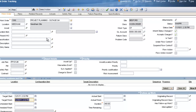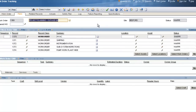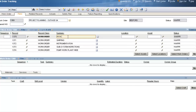Let's see what that job plan did to this work order — click on the Plans tab. Because we had nested job plans within our project job plan, it created a child work order for every one of the tasks on our project planning job plan. We basically created six child work orders. Each child work order lists the overall project work order as its parent — so we now have a parent with a hierarchy of six child work orders. Each department manager would take their own child work order and plan out their work for that specific outage.